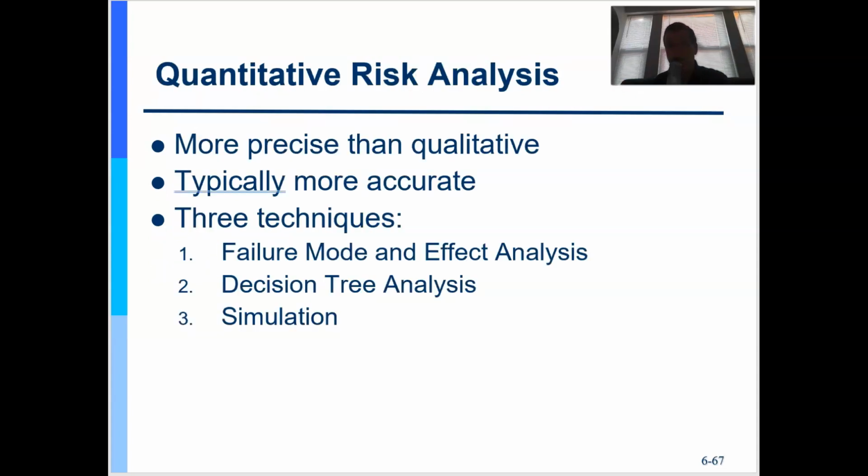And then I want to do this for only the few risks. Now remember, I just took the risk register, then I did qualitative risk analysis, and I reprioritized it. For the very top priorities, for the ones with the highest probability and impact, there I will do quantitative risk analysis, which is much more methodical. It's going to take time. I'm going to go out and do real research, maybe marketing studies or impact analysis, etc. That takes time and uses resources.